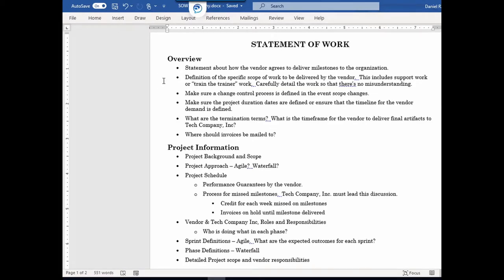The next point is the definition of the specific scope. Consider not just the development scope, but how the vendor will also provide support — support work as well as train-the-trainer work. They develop the software, but how will they train our super users? Eventually we want to let go of this vendor, and we don't want to be in a position where our organization doesn't have people who can train others on this particular software package.